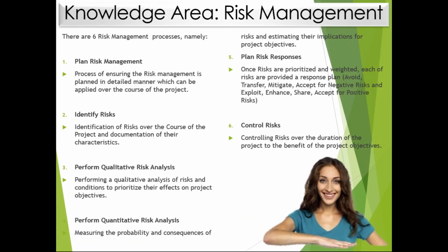We took a collective decision that these are the right sources and we should be analyzing risk from these sources itself, which could be the lessons learned of the previous document, document analysis, stakeholder interviews, and so on. So that is what we do in the plan risk management. Then we mentioned how we're going to identify the risk. Once a risk is identified, how we're going to do the qualitative and quantitative risk assessment.